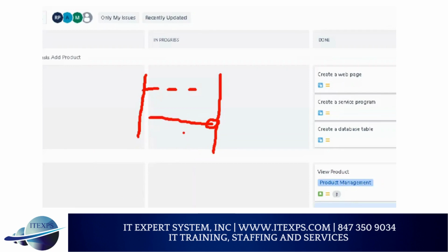If you have completed all work, let's say earlier than the sprint days, then you will ask the product owner, what additional work should I work on, and then you start working on the next story which the product owner gives you. You make use of that. Your sprint is fixed. If you have selected 2 weeks, then it's fixed. On the last day, you will have a sprint demo and your retrospective.